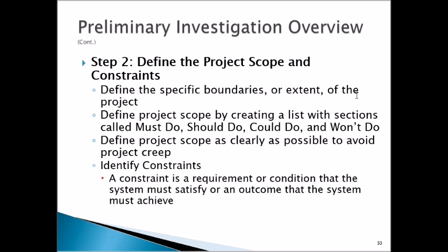What I was describing isn't something that's out of the ordinary. It's not a request that wasn't feasible. However, due to the constraints that were set on the project, it was something that was too much, and it was something that was introduced as a very late add-on kind of thing. So when you're doing a project scope and constraint, you need to build it into sections: the must do, should do, could do, and won't do. So something like this could have been added here, like I was describing above, but it would have to be foreseen, and it wasn't necessarily foreseen in this case.